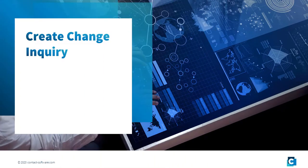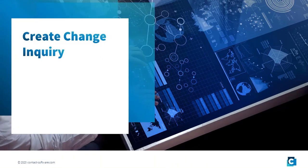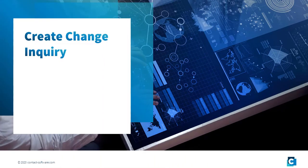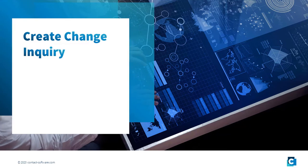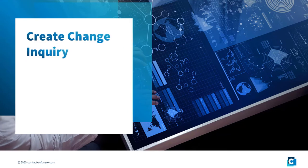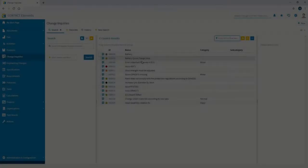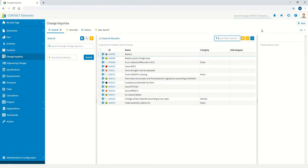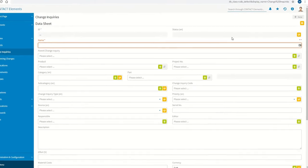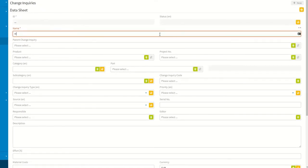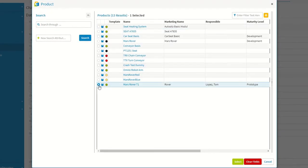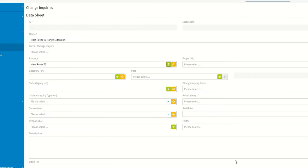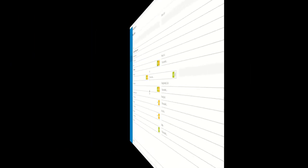The current engineering change process, or EC process for short, begins with a notification of the need for a change. The persons and roles that have been granted permission can create change inquiries using the web-based user interface. These can be sales staff or partners, for example. Appropriate masks allow the required information to be entered and, for example, a direct reference to the product to be established.